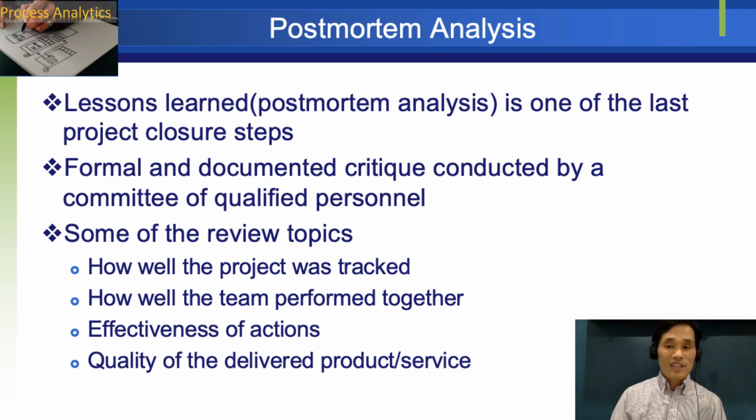In other words, this is a lesson learned from the failure or success that has to be documented and written and shared with others. One of the last project closure steps is the post-mortem analysis. This review is often a formal and documented critique conducted by a committee of qualified company personnel, which often include Six Sigma professionals. The review process is often established by management policy as well.